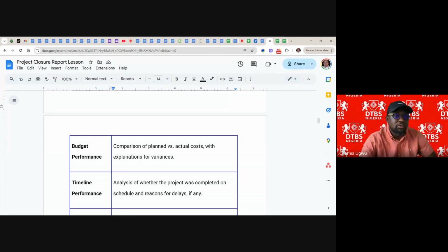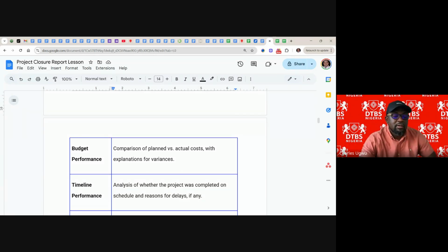It's important. So, and budgets, these are where you need to pay attention. The stakeholders will want to look at these; these are some of the areas they will quickly go and look at. Budgets comparison, that is comparing the actual budget and the planned budget. For instance, if we agree to use £10,000, then we need to look at what we actually spent.